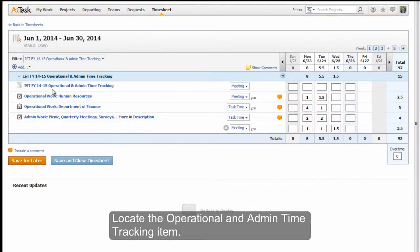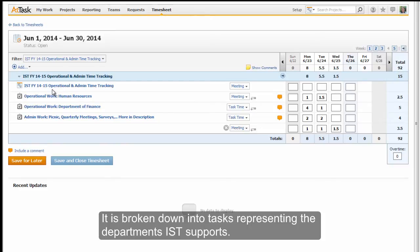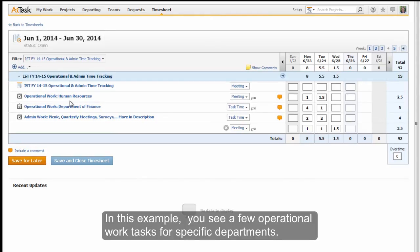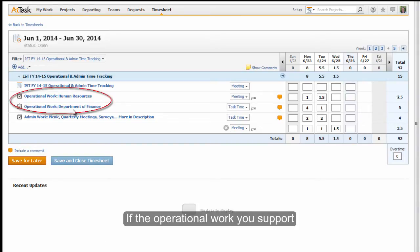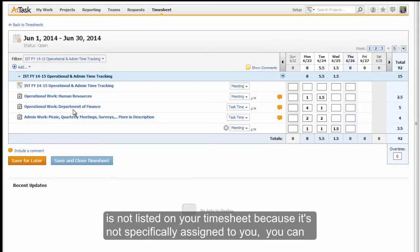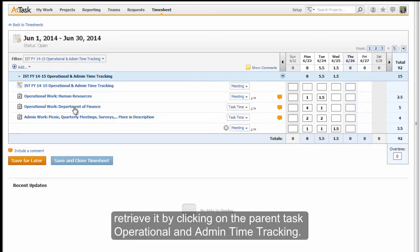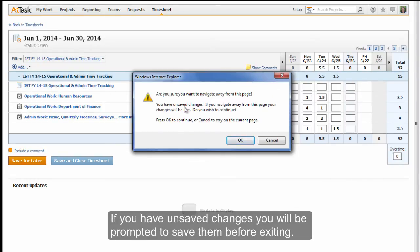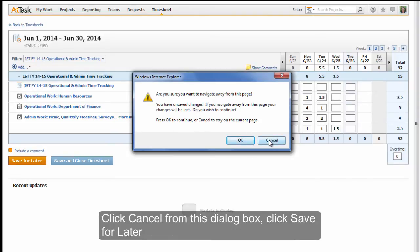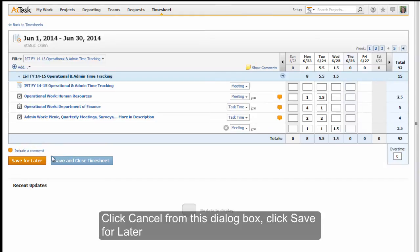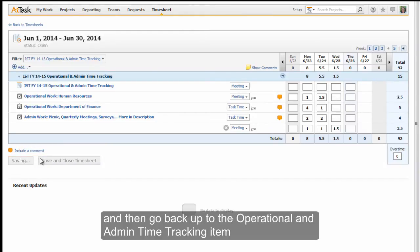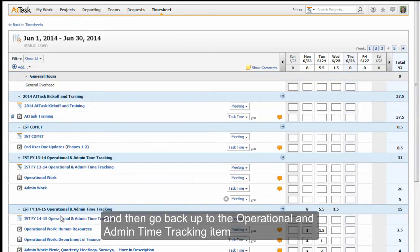Locate the operational and admin time tracking item. It is broken down into tasks representing the departments IST supports. If the operational work you support is not listed on your timesheet because it's not specifically assigned to you, you can retrieve it by clicking on the parent task operational and admin time tracking. If you have unsaved changes, you will be prompted to save them before exiting. Click Cancel from this dialog box, then click Save for later, and go back up to the operational and admin time tracking item and click on it.